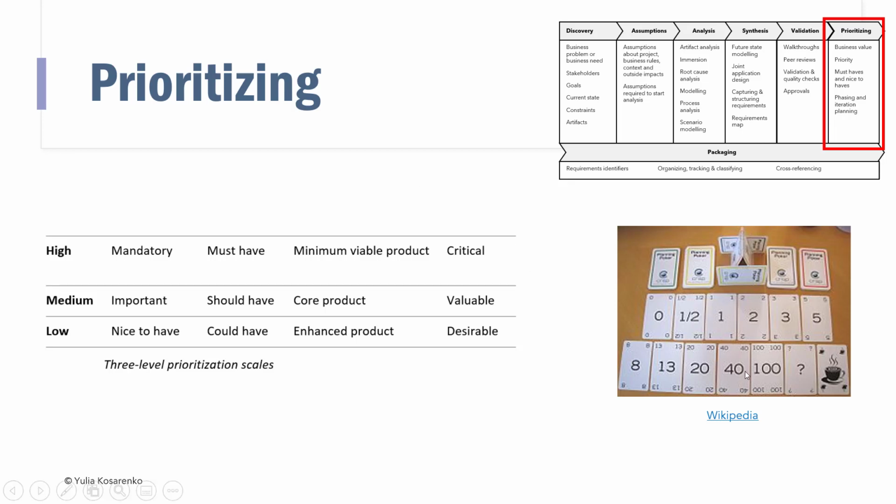There are more granular ways to prioritize. It's often used in Scrum methodology, using numeric business value that can range from 0 to 100 or even higher, often using the Fibonacci sequence. And that helps you define something that is very important, for example, with a value of 100, versus just average, medium with a value of 20, and other user stories that are much less valuable, 1, 2, 3, 4, 5. So just make sure that you have a system that everyone agrees to follow and prioritize.